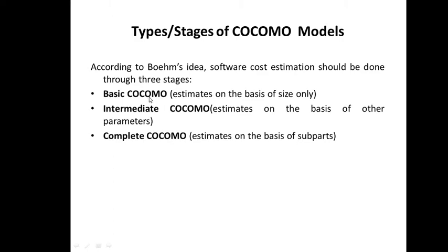So what is the basic Cocomo model? Basic Cocomo model makes the estimate of effort, time and cost totally on the basis of size only. Remember we did size estimation earlier. That is why we did the size estimation, because the other estimations are totally based on this parameter, that is size, which is measured in lines of code. Numerically we'll be using the first method of size oriented metrics, that is size metrics will be used here, which is LOC, lines of code.